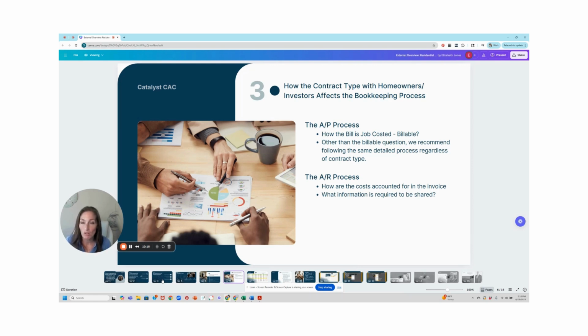And then also for a lump sum contract, you do not need to attach all of the backup files. Now, like I said, I would not change my tracking process. I would still use Adaptive, put the PDF to every single bill and give them a great presentation with a draw, and have that ability to pull that backup if we need to. But you don't have to give that exposure to the homeowner on a lump sum contract. You have the freedom to just give them a one-page invoice that says construction draw, 300,000.